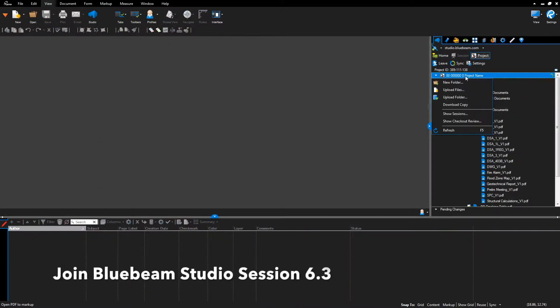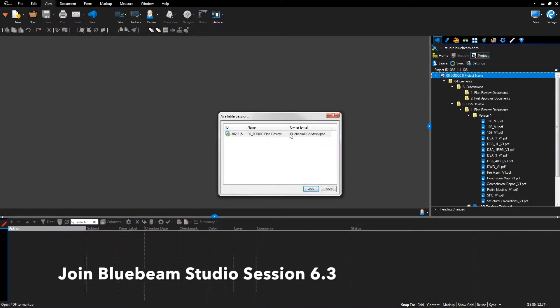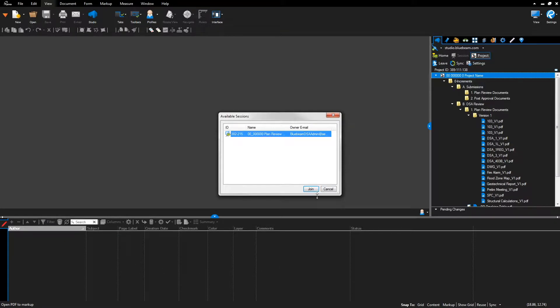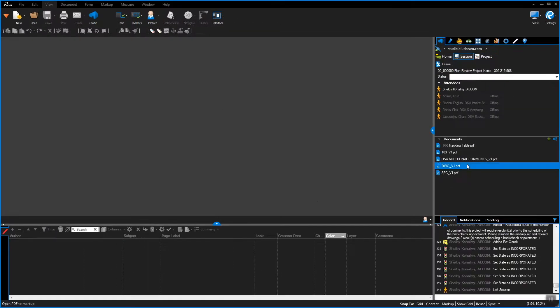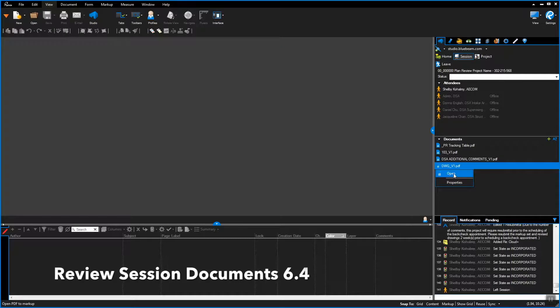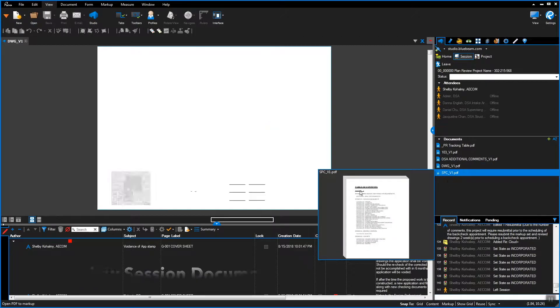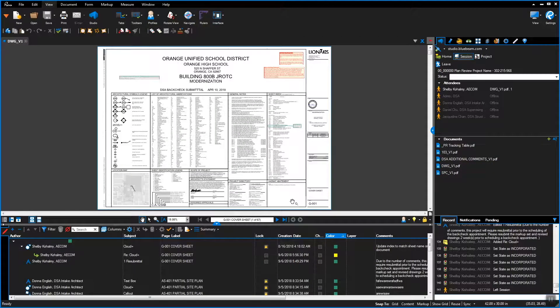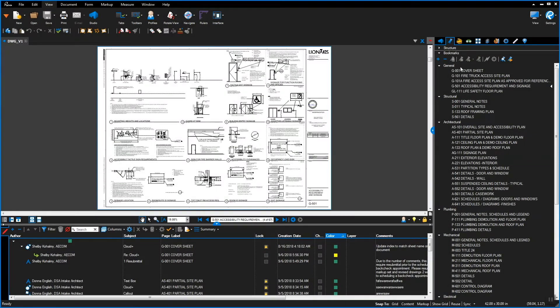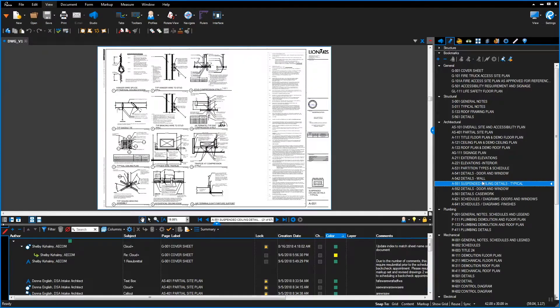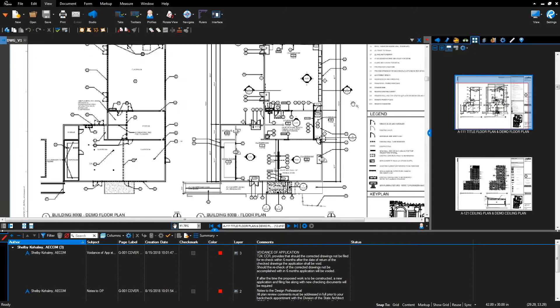Join the Bluebeam Project session: right-click the project name, select the session, and click Join. Review session documents by right-clicking the document and selecting Open. Navigate pages using page labels, the Bookmark tab, and hyperlinks.